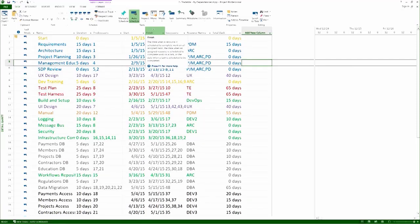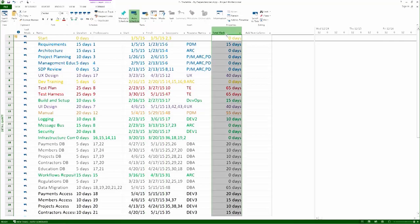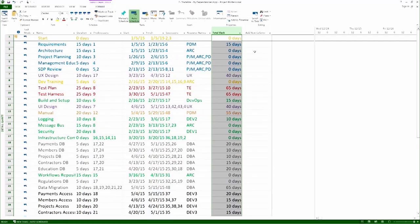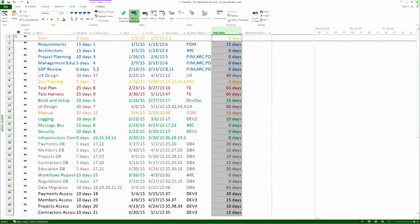Again, the two useful values here are the finish dates, useful for the earned value charts, and the total float, useful for the risk calculation, of course, during staffing as well.